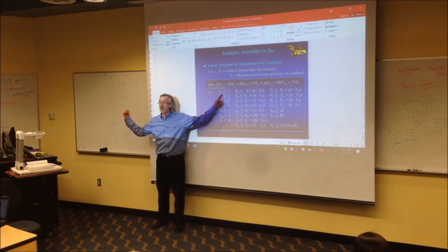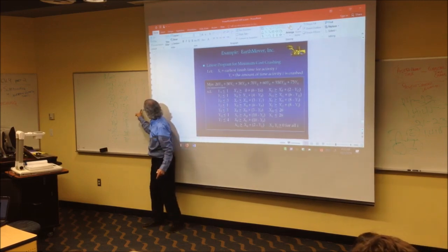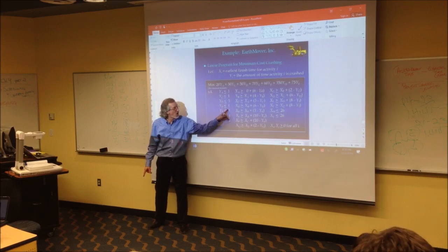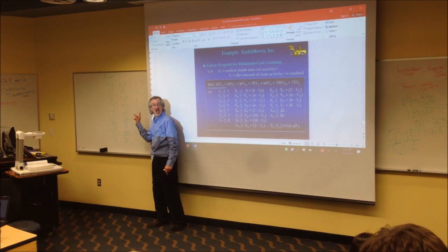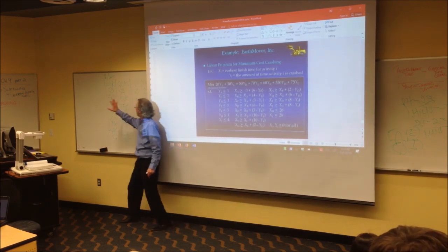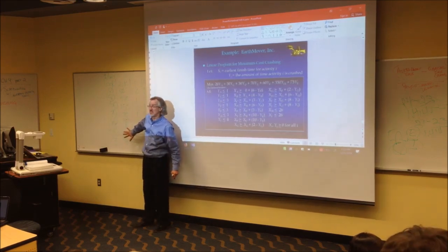B's gone because it won't be crashed. It's a 0. Y sub C is less than or equal to 1. There's only 1. For D, there should be a 3. Y sub D is less than or equal to 3. All the way exactly to the numbers you have in this column when I asked you how many units could be crashed. So that's easy, right?